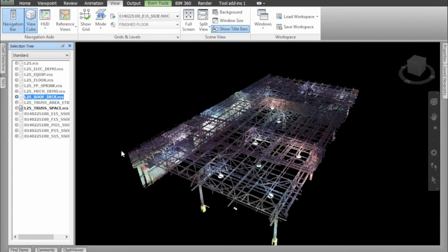Once we get into the demolition drawing phase, we mark up, as you saw in that 2D representation, with notations, specific items to get demoed as part of the process. Most projects, once again, don't have the luxury to rescan after demolition's done. We've already issued our CDs, and we're on to the next project before they even start ripping stuff out of a facility usually. So we can't come in and do a laser scan post-demolition because our drawing's already released.